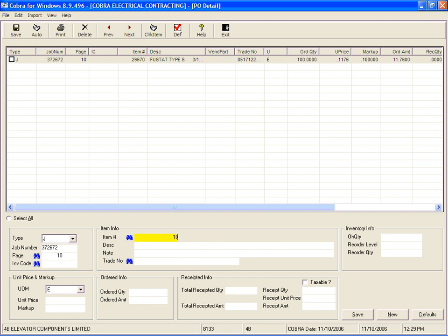Now let's take half-inch EMT for an example, so I can do a better job of explaining the unit of measure for you. I normally buy half-inch EMT in hundreds, so I'm going to select C there. And my unit price per each is usually 49 cents. So my order quantity now is 100, or my unit of measure equaling 100 times my order quantity.